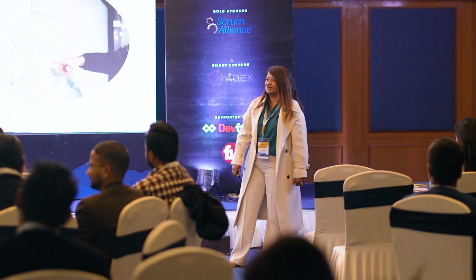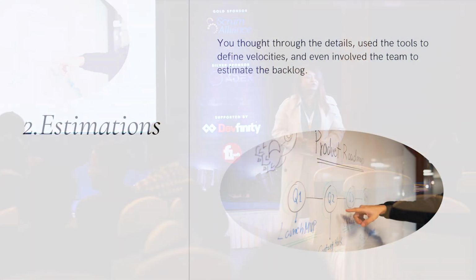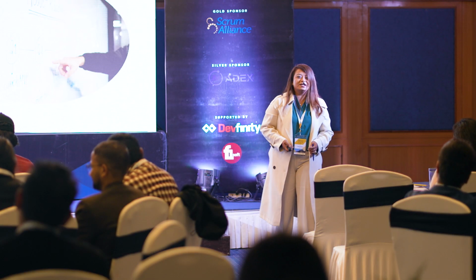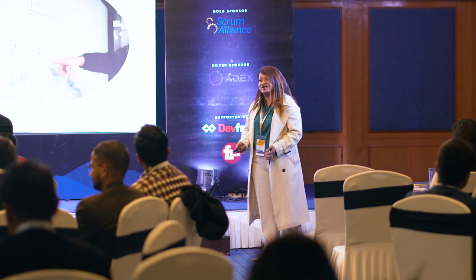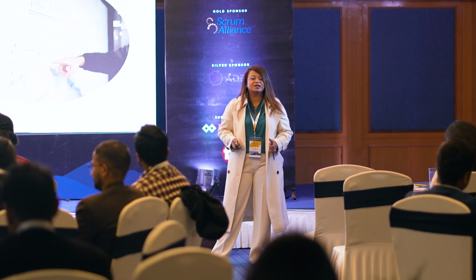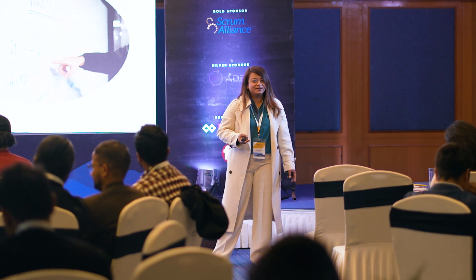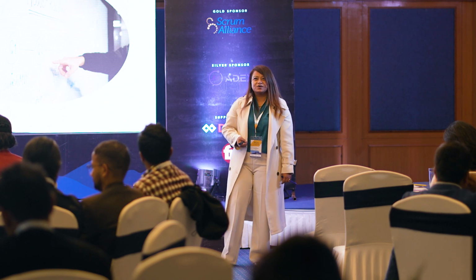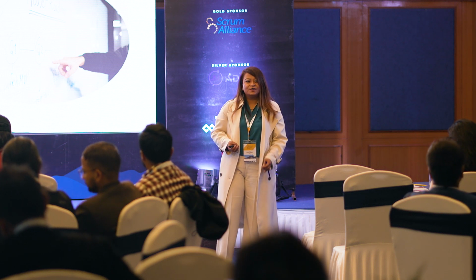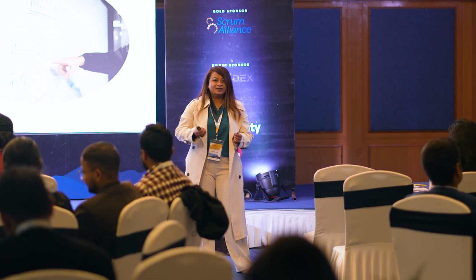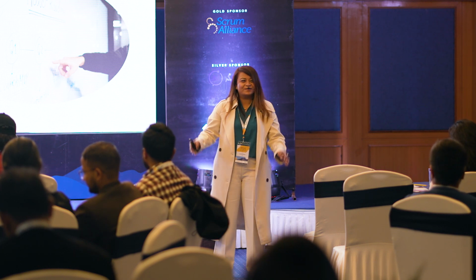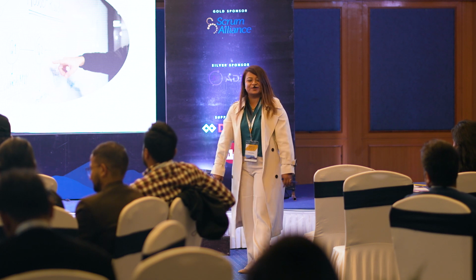Next up is the estimations. So you thought through all the details. You planned it, you know your velocity, everything is provided and divided accordingly. Sometimes teams give story points and then think of it in hours, calculate it in hours. So they then think, what if the given story point is not enough? So they start keeping buffer time. And then one buffer time, two buffer time for different requirements. There's a whole lot of buffer time over there, just expanding your time frame.